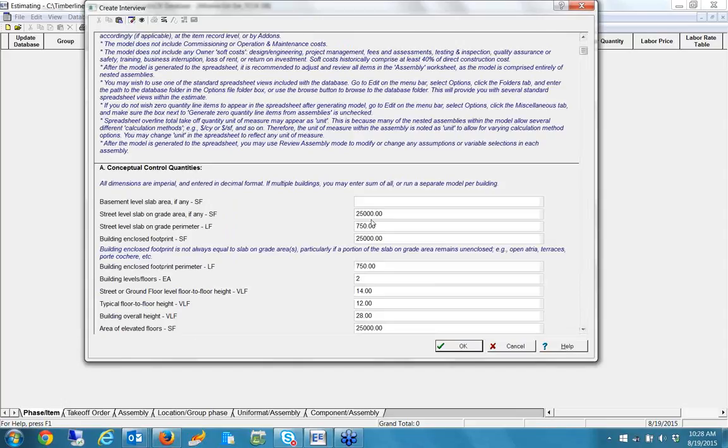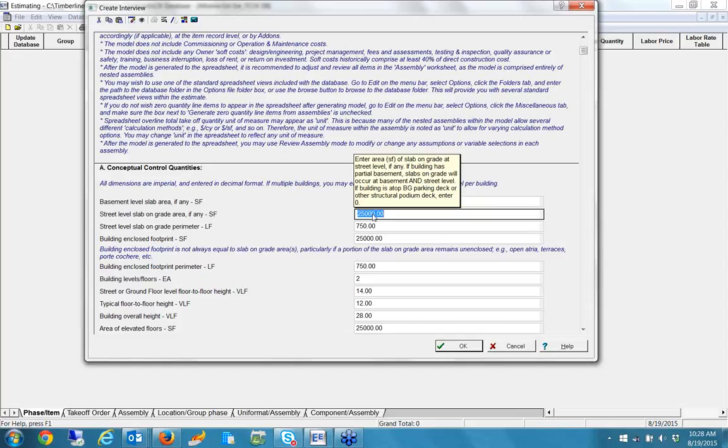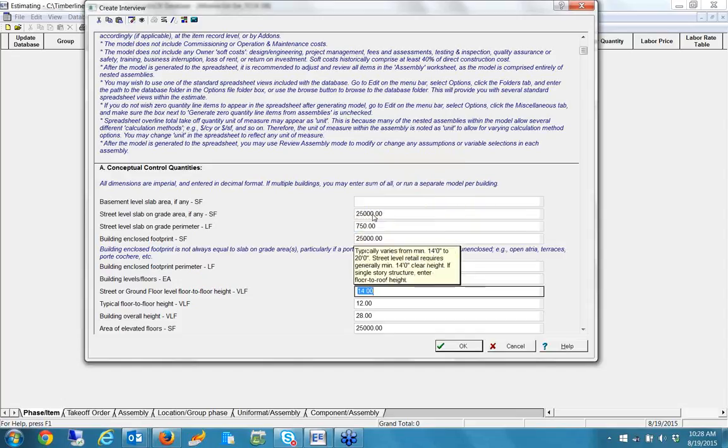But if you notice here, now it's not things tied to a specific footing or a wall assembly. I'm answering more high-level things. You know, how many levels do we have? What's the perimeter look like? What's the slab or the footprint? What's the average square footage of the decks? And as I'm answering those questions, fundamentally keep in mind this modeling will now drive.